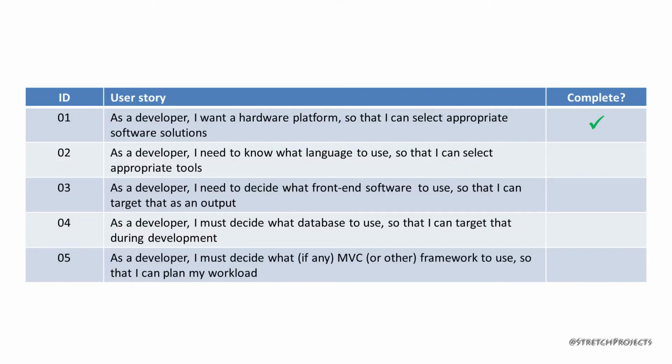The process begins with the development team sitting down with the product owner face to face, with access to the actual product that they've been working on. The development team lists in turn each individual user story which forms that particular sprint as agreed with the product owner. As they list each of the user stories, they demonstrate it in the actual product itself, displaying the fact that it is complete to the product owner.